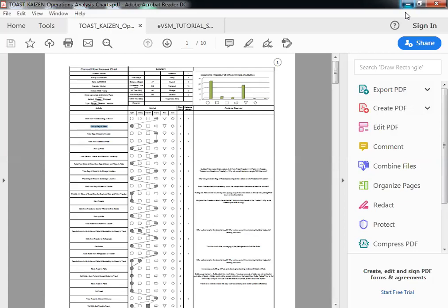So a tree diagram is basically saying I put the problem at the top of the tree, and then I ask, how will I solve the problem? So you put, say, 2 answers, right? Answer 1, answer 2. Then you say, how will I execute what I said about doing answer 1? And slowly what you do is you create what is called a work breakdown structure.